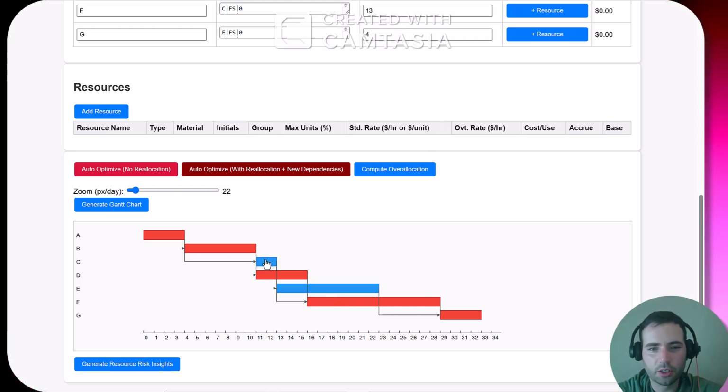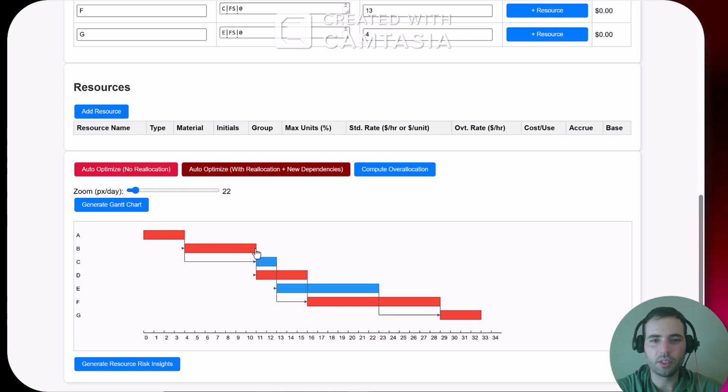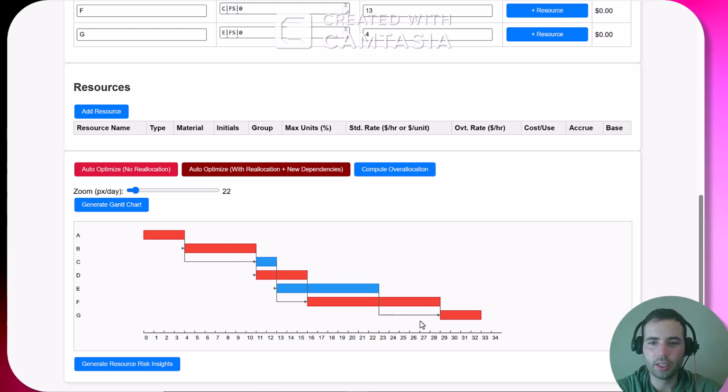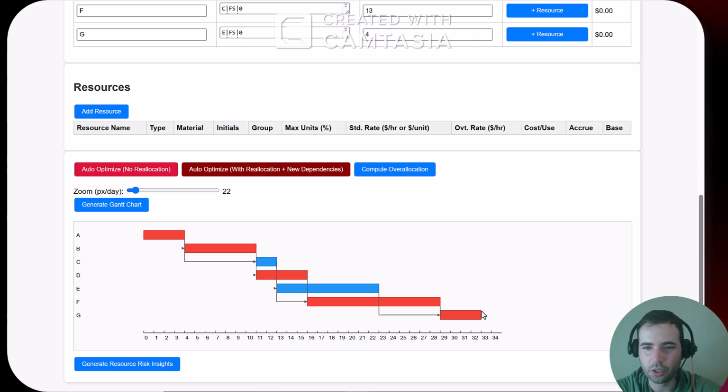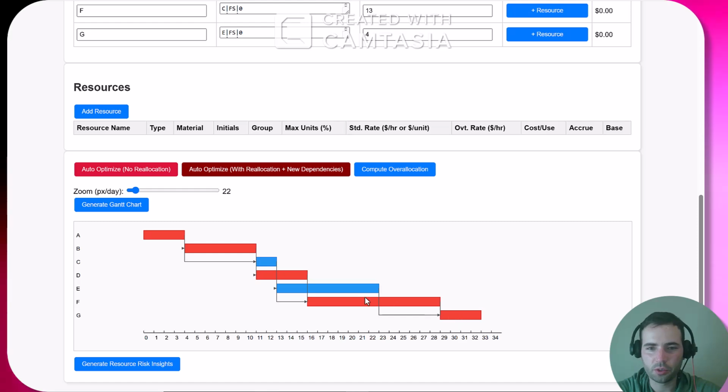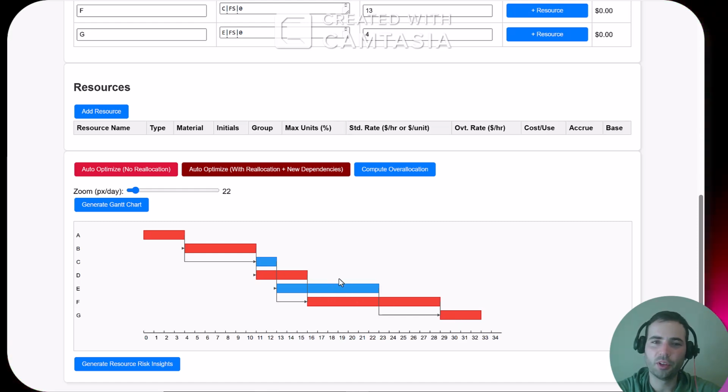As you can see, there are several activities that happen at the same time. So you may get into trouble if you have resources that are being shared among these activities. The red just means the activities that if they have delays will delay the overall duration of the project, which is 33 days. Now the blue, they have a little bit more wiggle room. They can move without affecting the overall duration of the project. That is called float, how much you can move them by.